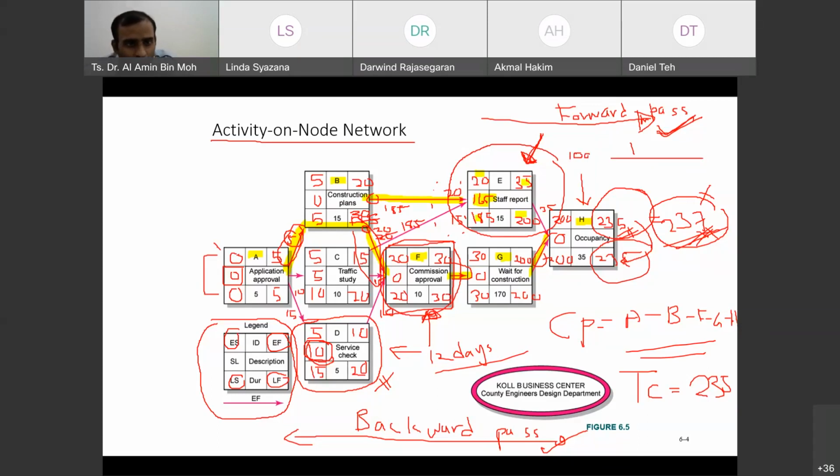You say it's going to impact this. But basically, we're not going to say it impacts the activity before. It should impact the activities going in the future. But I'm precisely asking for the whole completion time. So you should say 100 days is within the slack. It's not exceeding 165.